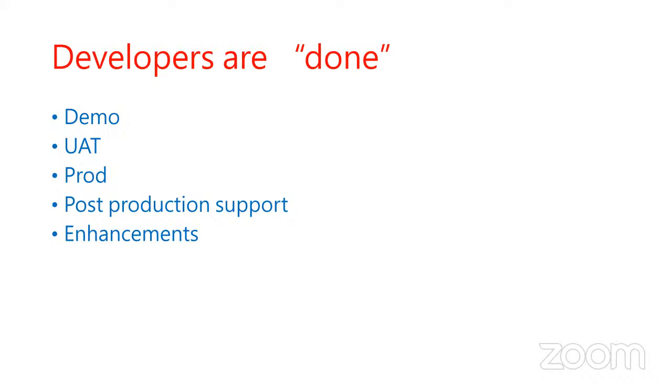They'll say, oh, I asked for this, but it is something different, a little bit deviated, I have a different requirement. You are going to accommodate some of them, and some of them you are going to make as phase 2 or next phase requirements. And that's how we complete our project. Then comes the UAT, user acceptance testing. This is where we give the product as if it's ready for use, but they do some testing because they want to make sure it is meeting the requirements of our client, because the client is the one who is paying all our project money.